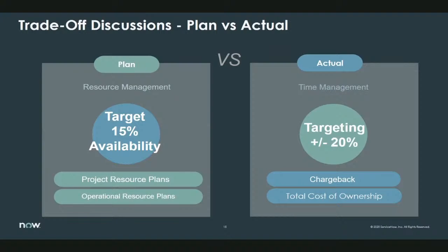So one awesome thing Tracy was able to do to help me be able to provide total cost of ownership information was use the rate model to be able to calculate both a fully loaded cost, where we do assign a cost to those 0 rate resources, and a chargeback cost. So now, when we are preparing the CBA back in the demand submitted state, we can use this information in the tool to provide that costing information.